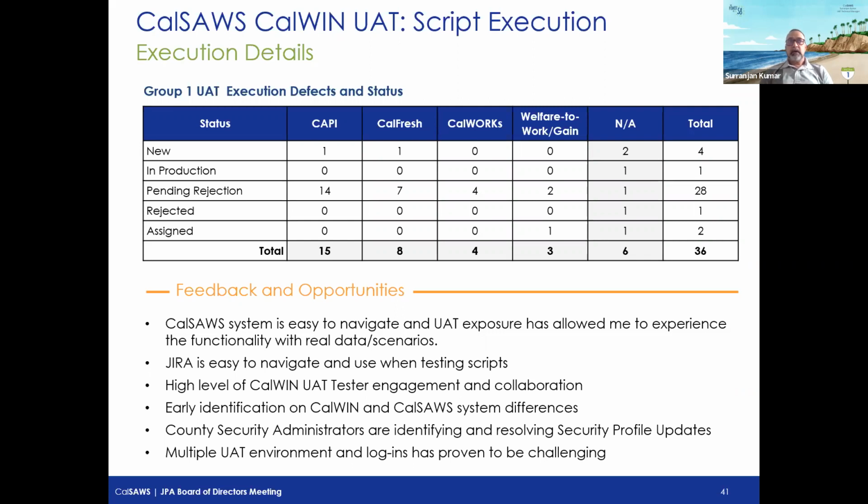have instituted additional processes. We have created a work group that consists of all the relevant team members to resolve those issues. We have shared a survey with the individual testers to let us know in advance which environments they are able to access and which they are not, so that we can get on those issues early on Monday and Tuesday next week, so that they all have a good seamless experience of using CalSAWS and validating the functionality that is part of group 2.